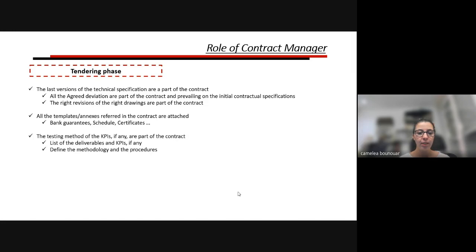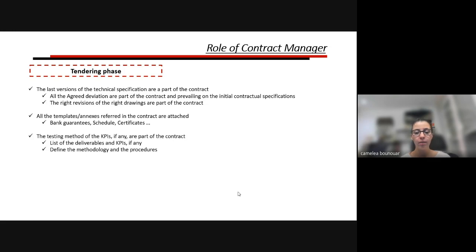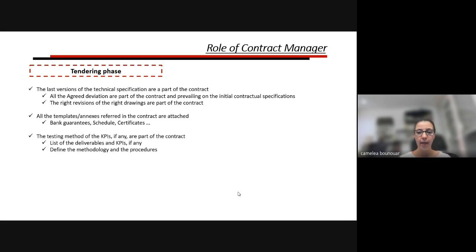Regarding test methodology and KPIs: sometimes a contract has key performance indicators to achieve but they are not well defined — who are they, what are they, what do you need to do to achieve them, what documentation is required, what is the methodology, how many times to run tests? If not clear at the tender stage, you'll find yourself negotiating from zero about these points at the end of the project.